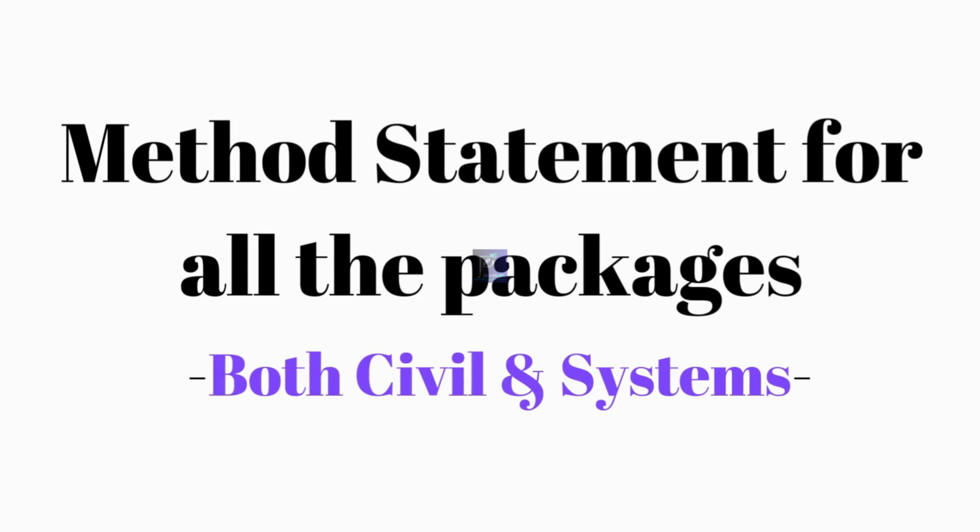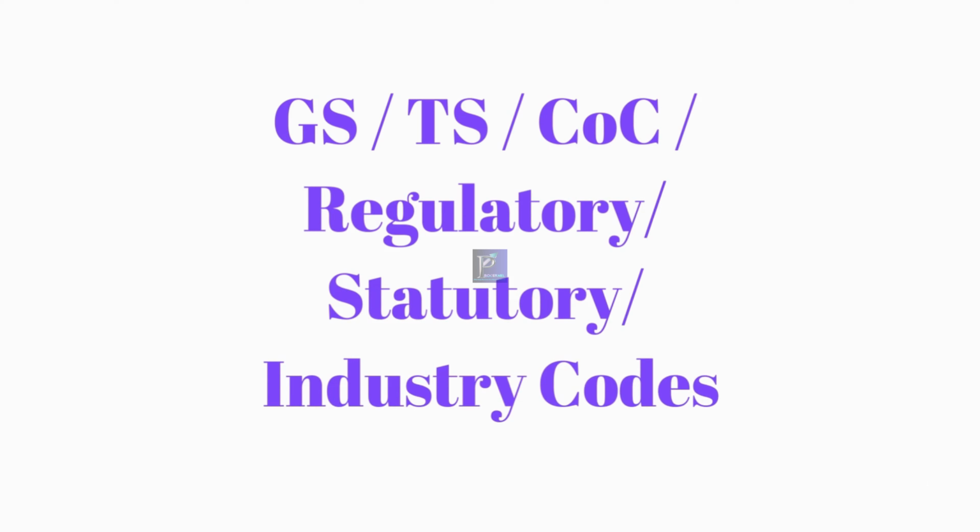This single document consolidates essential information drawn from various sources, including GS, TS, general specifications, technical specifications, conditions of contract, right? And industry requirements, codes and practices like IS, ASTM, for example IS 456 for concrete works, and regulatory requirements, ISO, RDSO. So all the requirements. Now let's take one example, the method statement for concrete works.